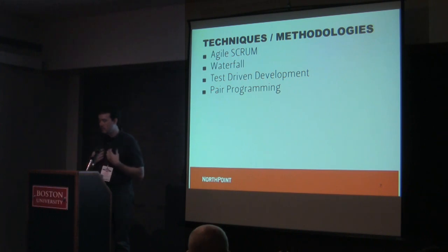But we like to mix it only because we need to give an estimate, we need to give a timeline for our clients, so we have to come up with that bigger picture, which is the waterfall, but then within it, we do sprints that we can report into the client as milestones and things like that.